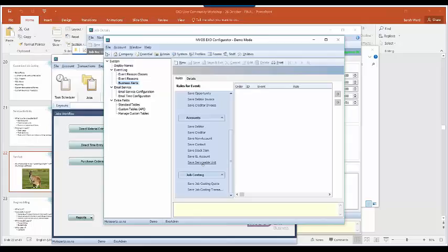We've actually used that on some of ours where we have a service maintenance contract with the client for $500 per service or whatever it is. We've got a trigger on the extra field so that if we've got a quoted amount rather than time and materials, it pops up saying the service unit has a quote. Do you want to proceed? So it's an override function. It's just a trigger for me when doing the billing, knowing that I'm not billing time and materials.